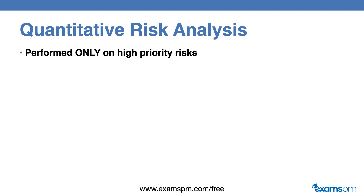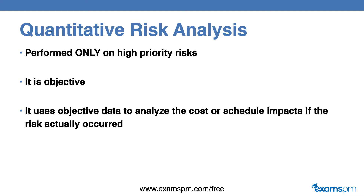This analysis is objective and it takes longer to do, so that's why we're only doing it on the high priority risks. The objective here is to actually find out what is the actual impact on the cost or schedule if this risk were to actually occur — so it's putting an actual number to it.